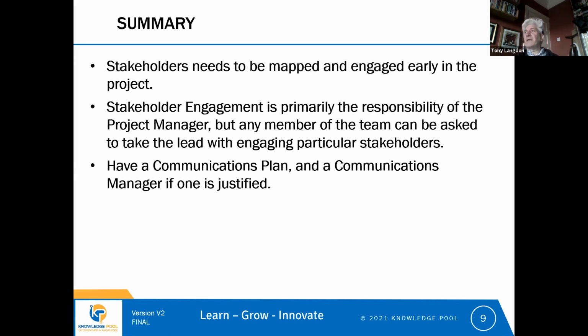But it's a balancing act, because you run the risk, if you don't spend enough time with the people who are currently positive about the project, that they might become less positive about it over time. If you spend all your time talking to the people that weren't positive, you may start to influence them and they may become more positive, but stakeholders who were positive may become less positive if they haven't heard from you.